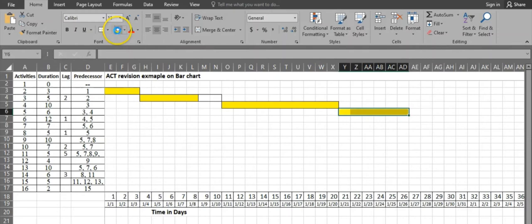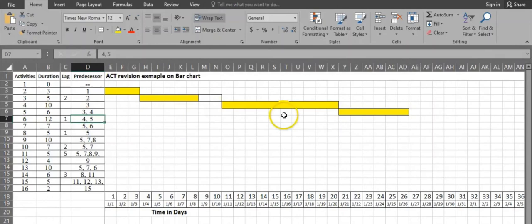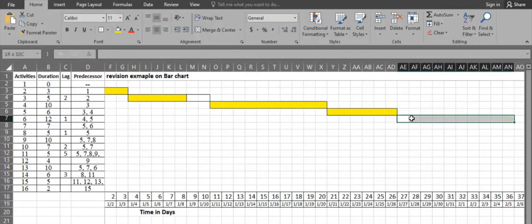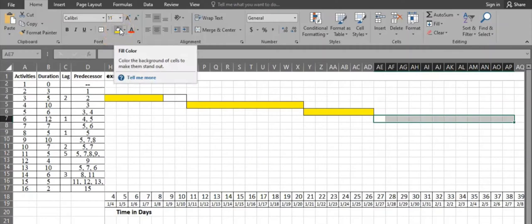Activity 6 has 12 days duration, 1 day lag, and predecessors are activities 4 and 5. Activity 5 is finishing the latest among the two, so we start from day 27. Activity 6 has a duration of 12 days: 1, 2, 3, 4, 5, 6, 7, 8, 9, 10, 11, 12.